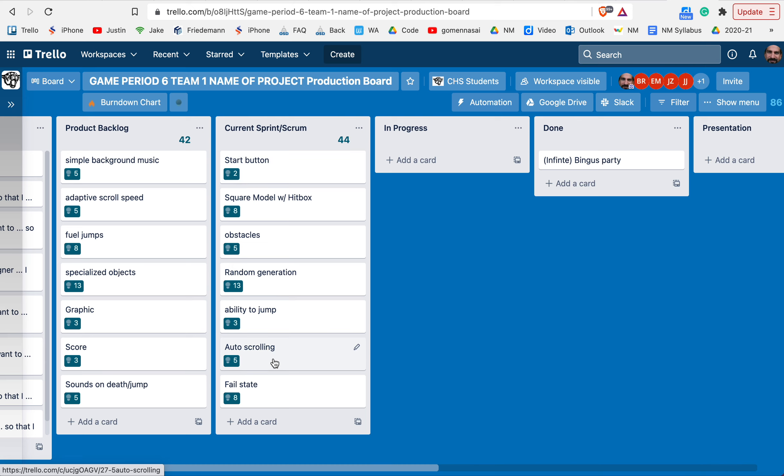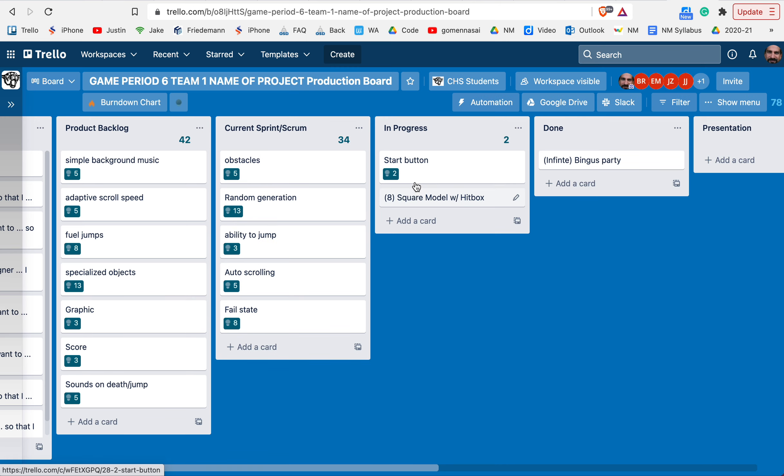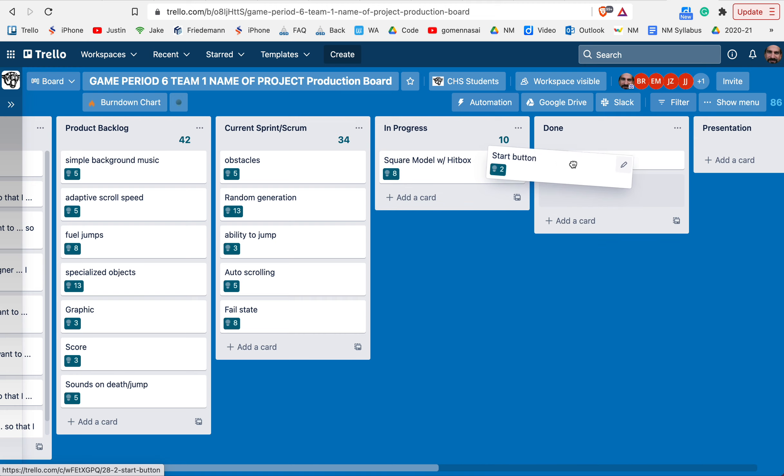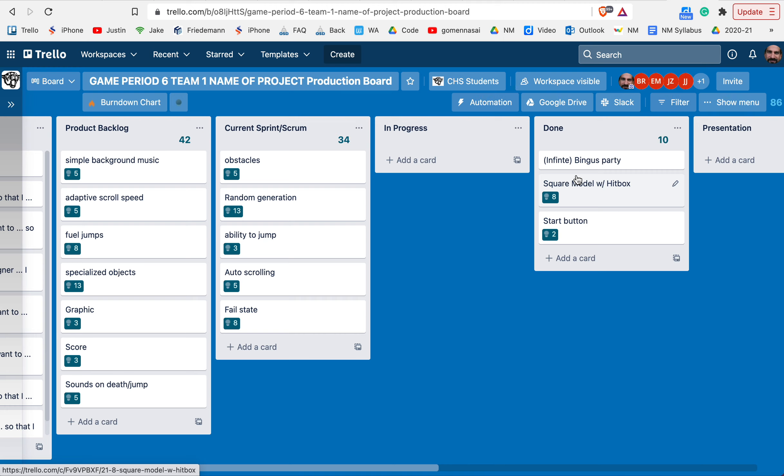What we do is start off with this number - the current number on top of the burndown chart. We'll say, okay, 44 is where we start. So we have these tasks in production, the bell rings, we go away, come back the next day and we're like, hey, we actually got those done. The next day in your stand-up meeting, you put those into the done pile and your update would be 34.